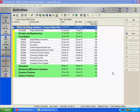Thresholds can be a useful technique to assist you in monitoring parameters such as start date variance or total float. You are able to specify a lower and or upper threshold value for your selected parameter against which your project data will be evaluated. P6 will generate issues for any data elements that exceed your thresholds. You can then use issues as a vehicle for notifying project participants about the thresholds and then determining and documenting corrective actions. We will discuss issues in more detail in a future tipcast.